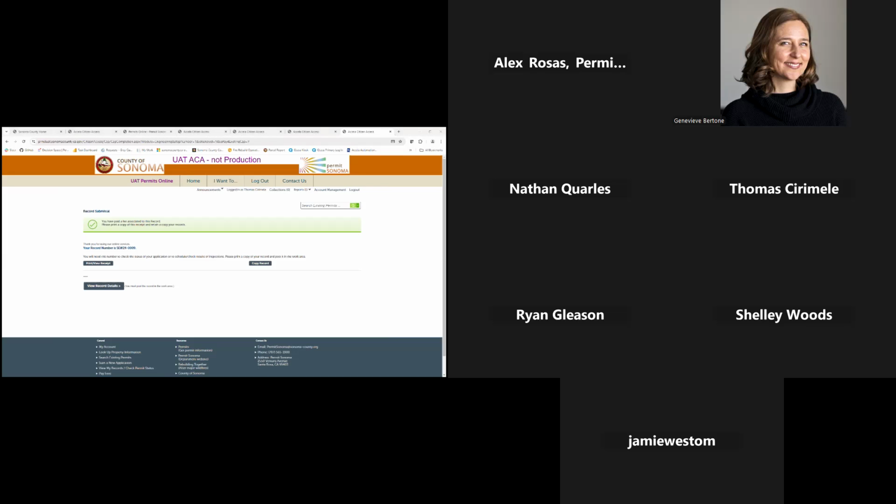There are also different kinds of plan check comments or issues in our systems. They're called issues that need to be addressed. They're generally either deficiencies with the application or other requirements, such as you might need to obtain another permit type in order to get your proposed scope of work moving along. We'll see that here momentarily when we turn it back over to Tom. I'm almost done with the very quick review.